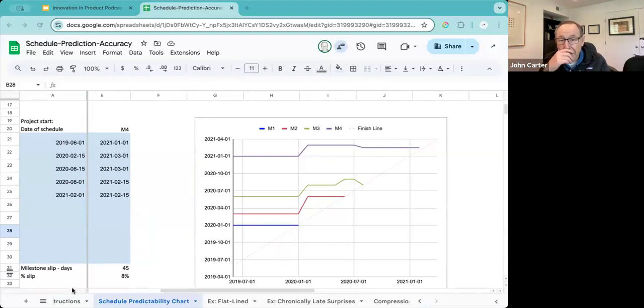And so this example here is a great example of a retrospective, and you can actually see the history of schedule pushouts and pushbacks over time, and where there was compression. You can look at, was a QA period compressed, or was it beta or development or high level design or whatever it might be. So it gives you some insight into it. And so retrospectively, it's a great tool for incorporating into your project retrospectives, but also real time.